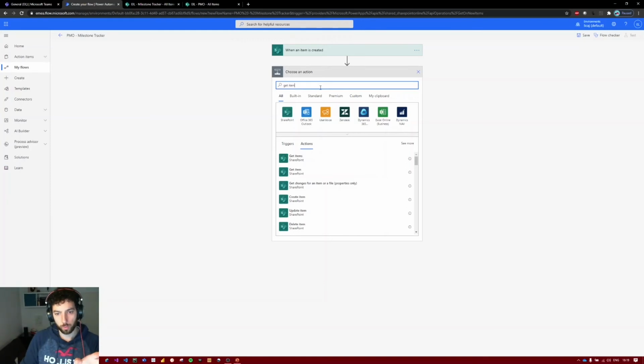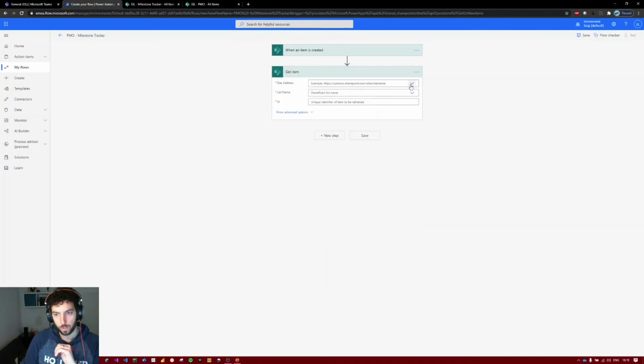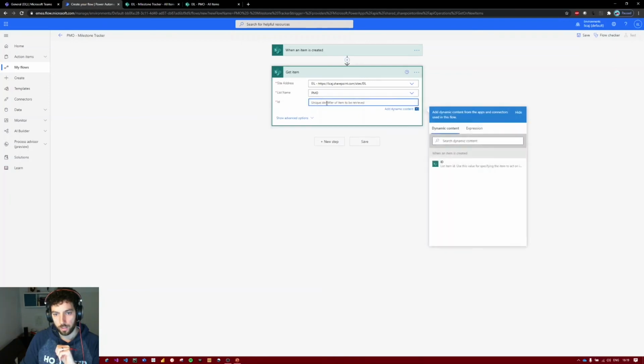But we won't go that way today. We'll use a simple automation that grabs every project that is inserted in PMO and copies it in the milestone tracker. So we'll select get item, select our site address, the list name, PMO, and the ID, as we can see here, the list item ID that was created.